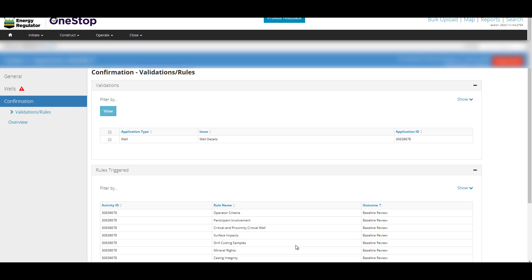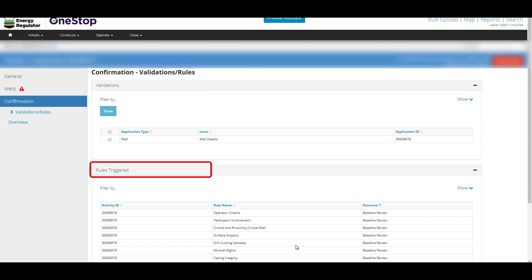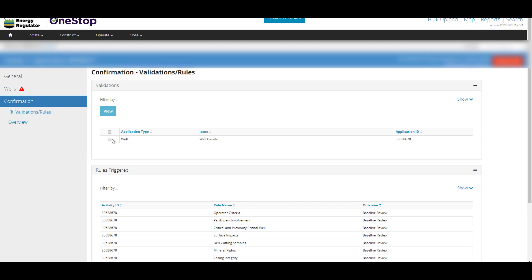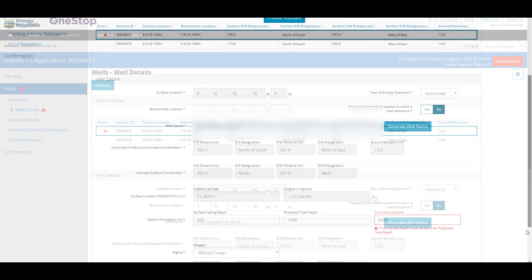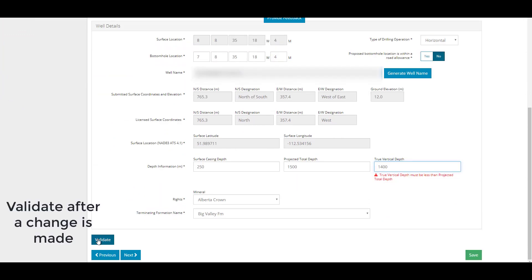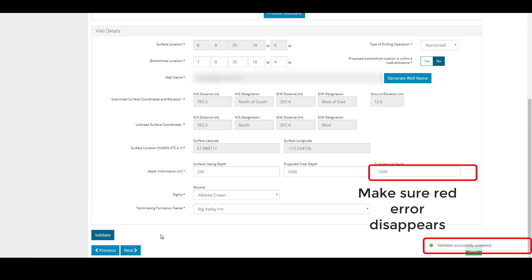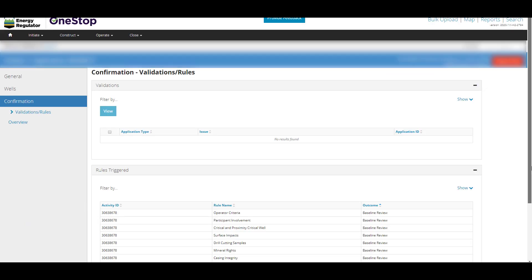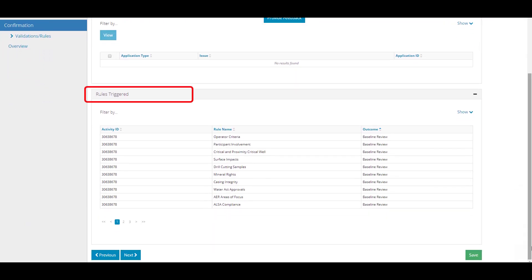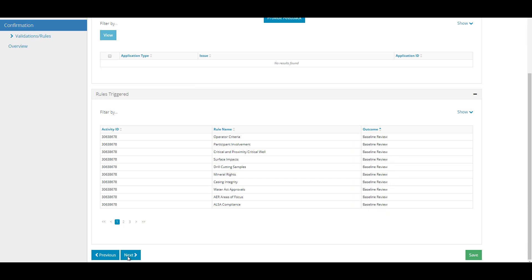The Confirmation Validation Rules page displays any validation errors and which business rules are triggered and the results. Sections that have unresolved validation errors or missing information are listed in the Validation section. Click on the grey box in a row to take you back to the page where the error has occurred. The Rules Triggered section displays the business rule outcomes. Baseline Review means that a manual review of the application is not required. In a multi-well application, business rule outcomes are displayed separately for each well. Click Next.